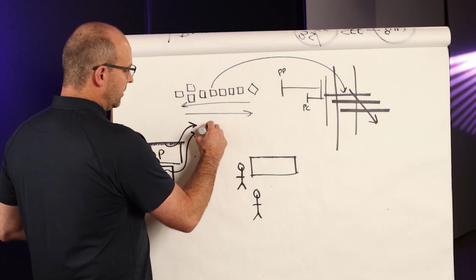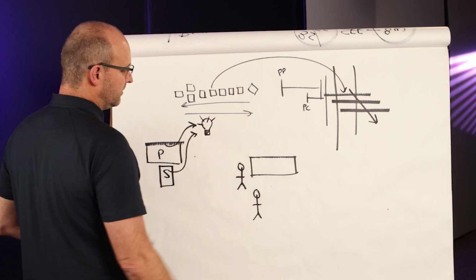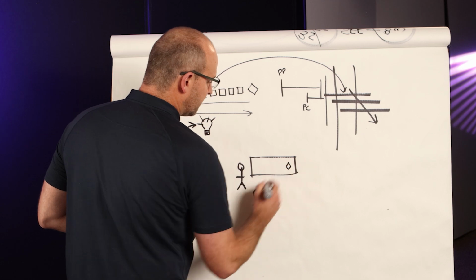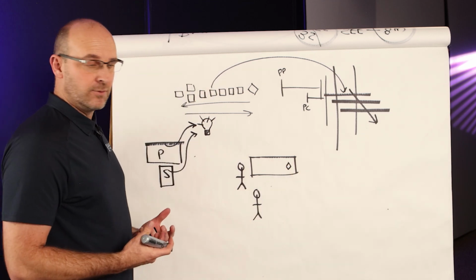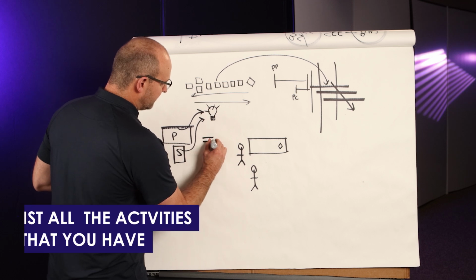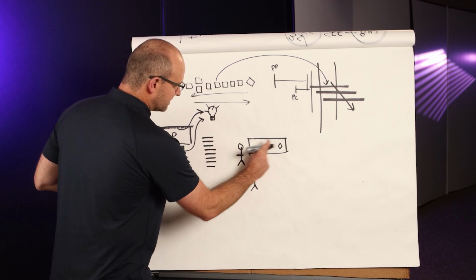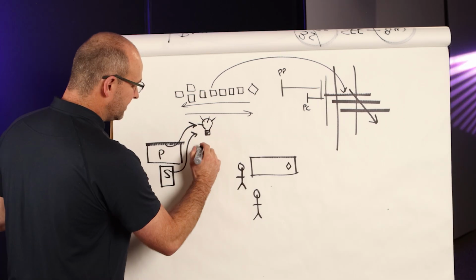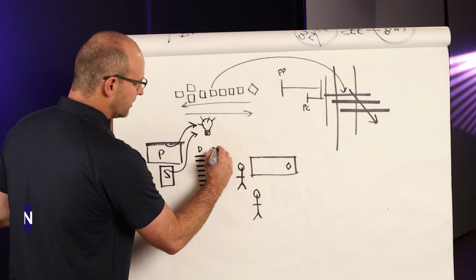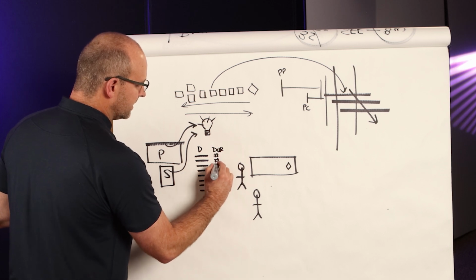So you need to know, and I'll draw a light bulb here because that's what I want you to be aware of, you need to know what's expected, what is the milestone that we are pulling to, what is the sequence that we're going to create. Now, when you come to the meeting, it would be ideal if you listed out all of the activities that you have in this sequence for this phase, and not only do you have the description, which I'll mark with a D, but you also have the duration, which I'll mark with DUR. So each one of these, duration.